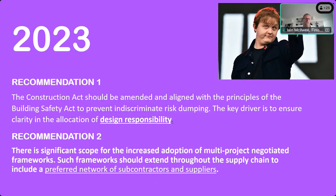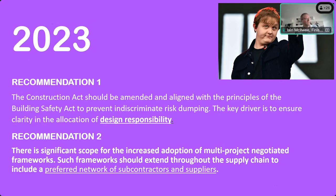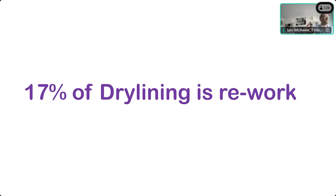That brings us to the conclusions from Stuart Green's work. The two big recommendations are that changes to the Construction Act should align with the principles of the Building Safety Act — preventing risk dumping and ensuring clarity in allocation of design responsibility. There needs to be a clearer design-freeze process and more time through negotiated, multi-stage project procurement. And this isn't just about safety: the reality is that 17% of dry-lining work is rework — somewhere along the line, the programme, the design or workmanship is causing dry lining to be redone.